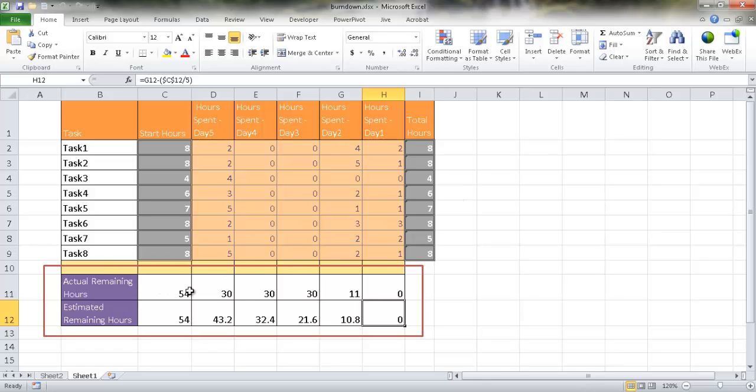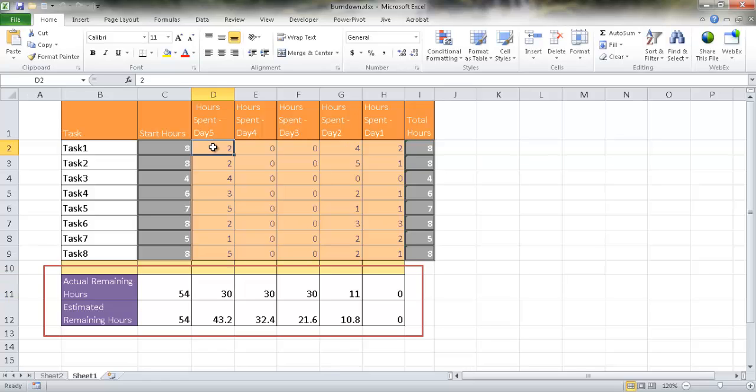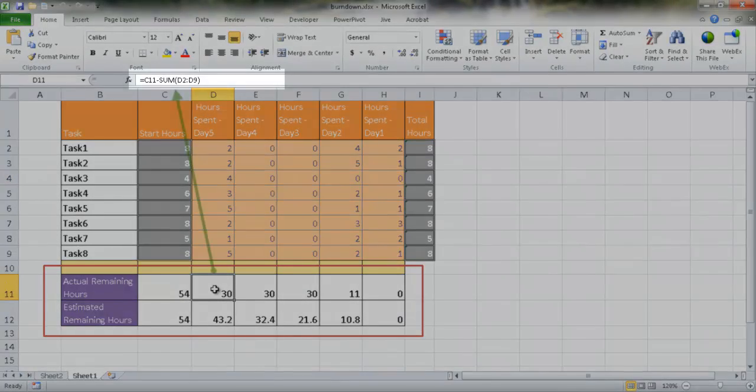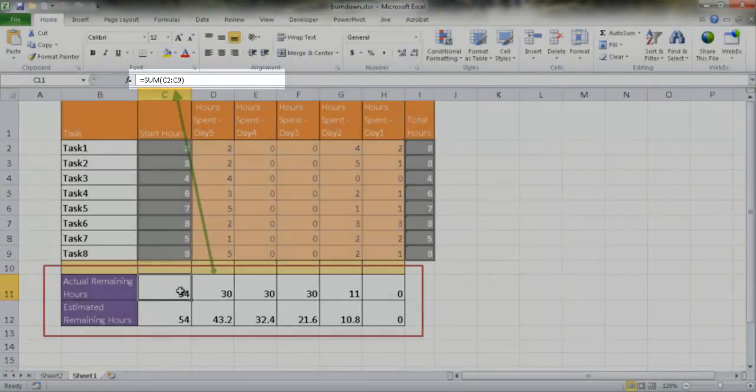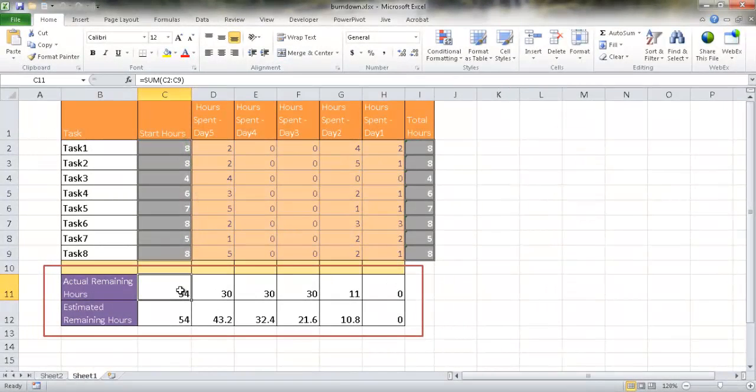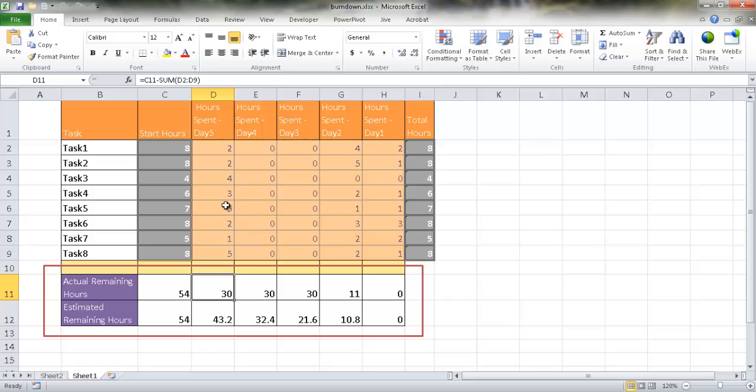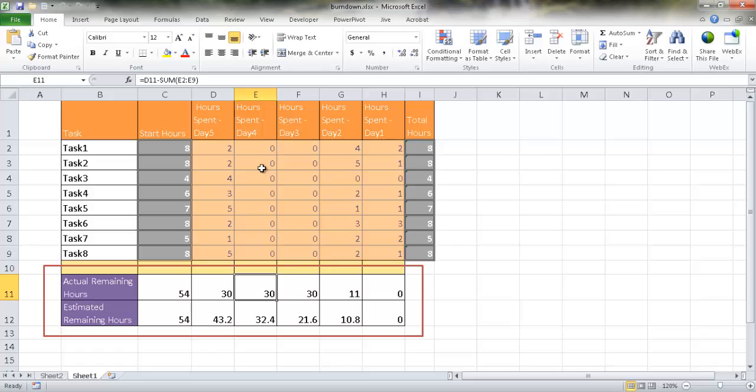Now for the actual hours remaining, what we're talking about here is once we start to go into each day and at the end of the day, we're going to allocate how much time we spent for each particular task. What this particular row is, is it's going to be the difference between the actual hours remaining from the previous day, in this case it's going to be just the start, minus the hours that were spent. So that's going to tell us what are the actual hours remaining. So as we go through the additional days, it's going to find a difference from the previous day, minus that from the sum of all the tasks that were taken into account for that day.